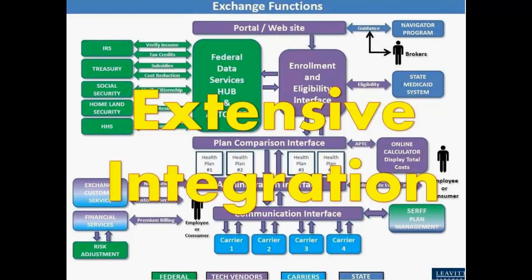You had a lot of integration, a lot. For example, programmers wrestled with a problem that snagged naturalized citizens needing DHS, Department of Homeland Security verification. So every system they integrated with would have had issues. I mean, these are stovepipe systems for the most part. They may be able to handle internal operations very well at Social Security or DHS, but those are all internal. And they were asking these systems to all integrate with an outside system in real time.